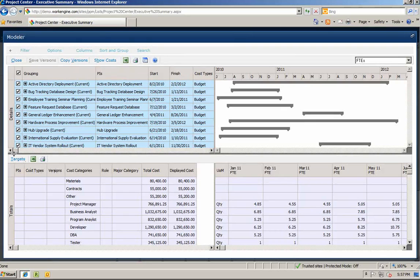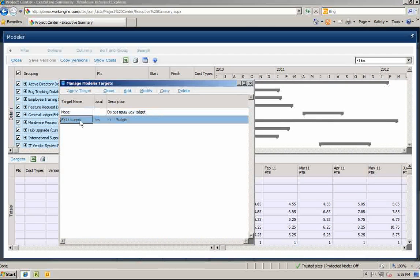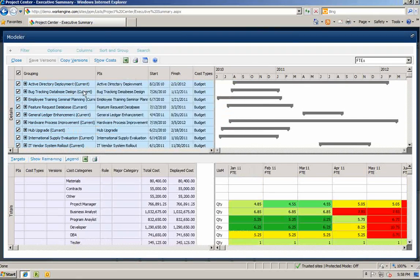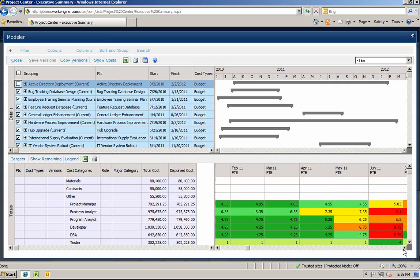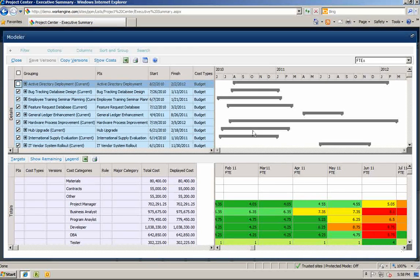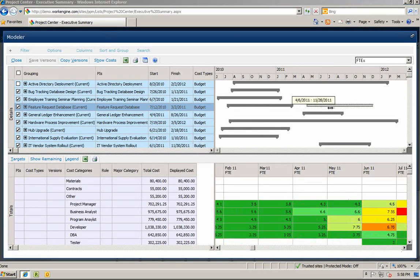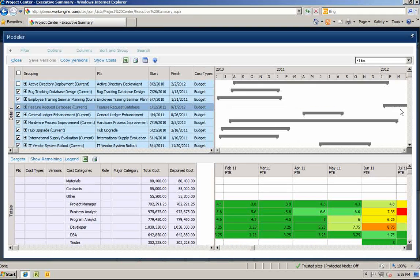Let's compare this resource plan against the FY11 budget target. By applying the target you can now see where we are over allocated on resources by role. You can then start to perform some what-if modeling. For example, what if you cancelled the Active Directory project and what if you moved the feature request database out to 2012? Now you can quickly see the impact on resource staffing should these what-if scenarios be applied.